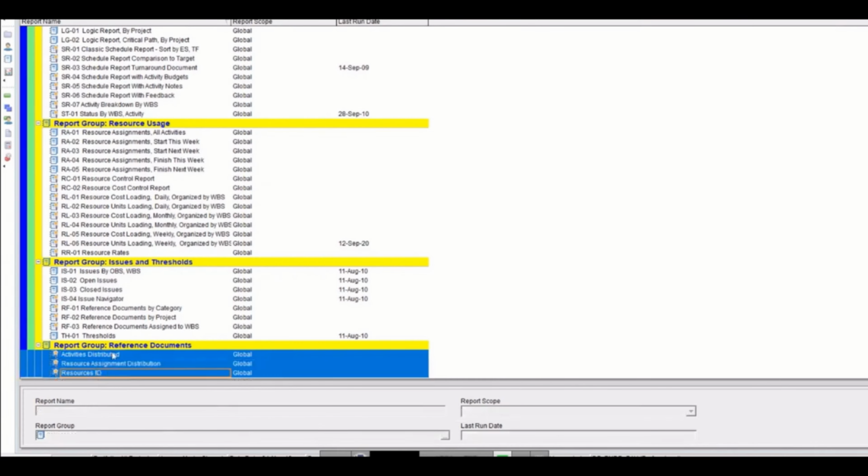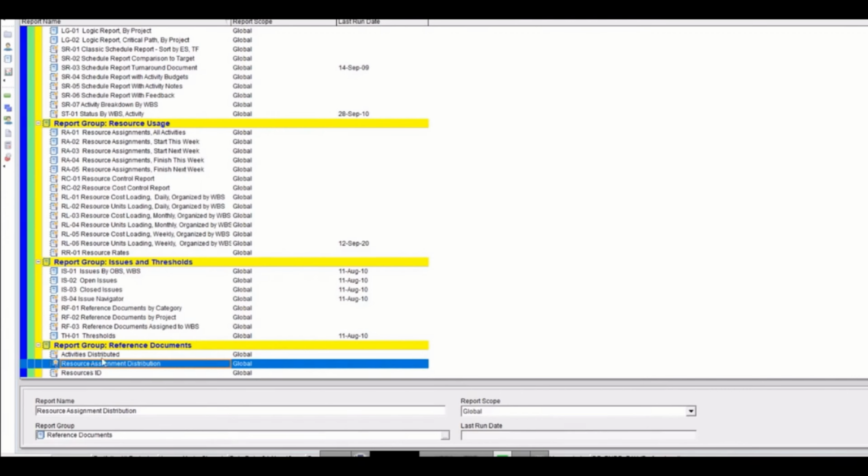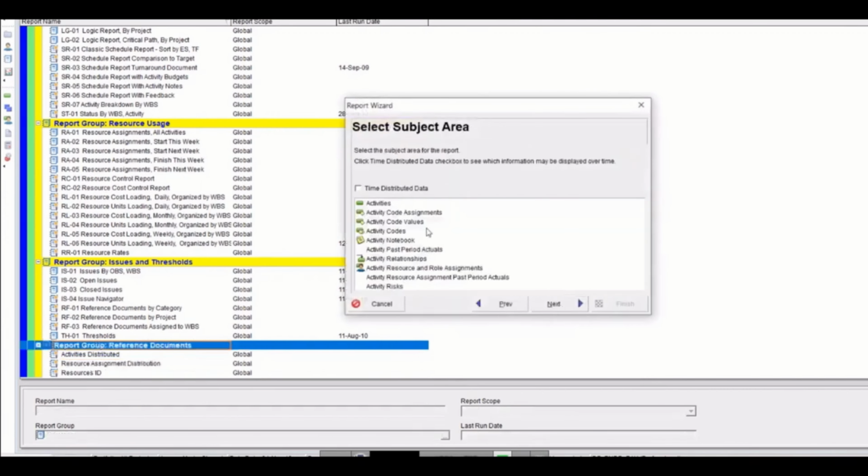We will learn how, because this is the development of the data source. So we are developing our data source. We are extracting the data from P6, and this data will be fed to Power Query where we will do the data structuring. So this is an automation. You only need to run the report once. Once you update the progress, run the report, and it will go into Power BI. So the final report which we are going to make is a fact table. For that we also need only this. We do not need the distributed data.